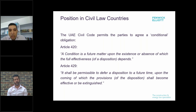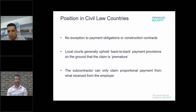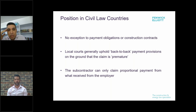These two provisions are specifically referred to by high courts in the UAE in several judgments upholding back-to-back payment provisions. The broad definitions and flexible provisions on conditional obligations suggest no exception to payment obligations — unlike the position in English law, there is no exception for construction contracts. The approach of local courts is straightforward in terms of upholding such payment provisions and dismissing claims filed by subcontractors on the basis of premature filing where the main contractor proves it did not receive payment from the employer.